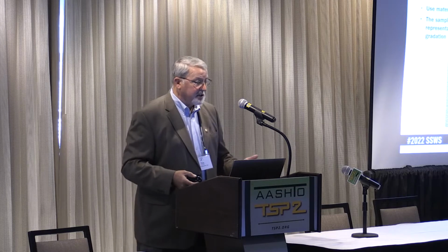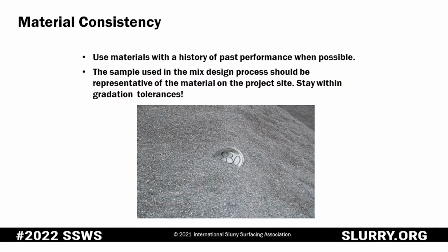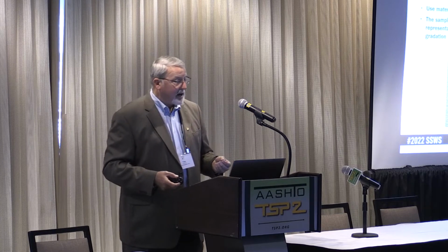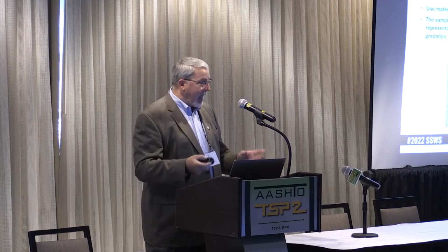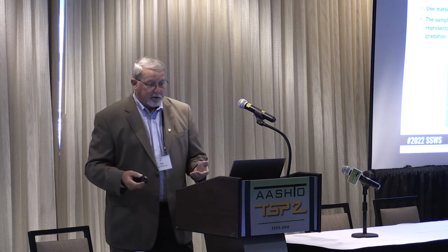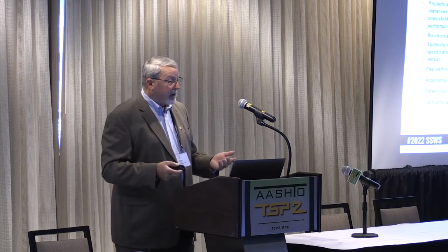You have to have that consistency, and it's important to check and stay within the tolerances set forth in that ISSA 143 mix design criteria. If you get a little bit outside it, it's not too big of a deal, but it can be checked out in the lab really quick, and an adjustment to that mix design can be made, resubmitted, and approved. So it's important.